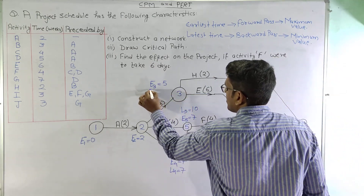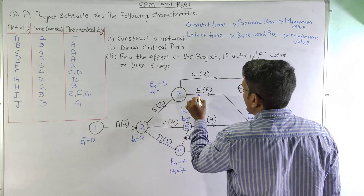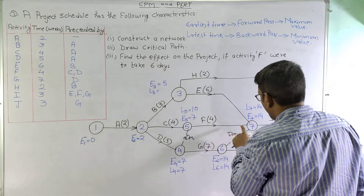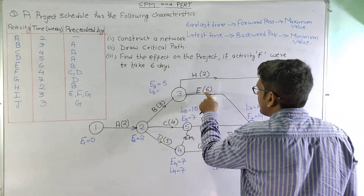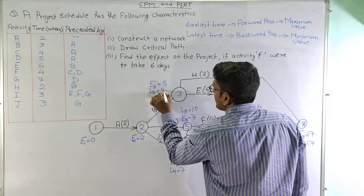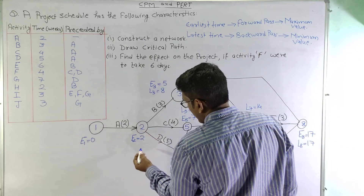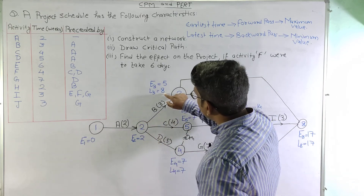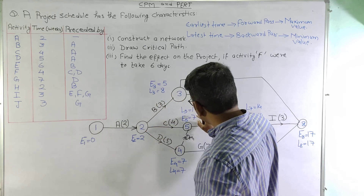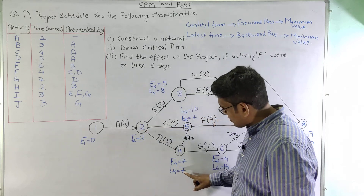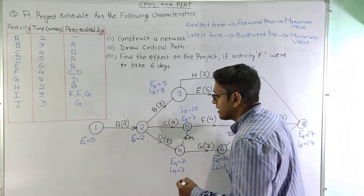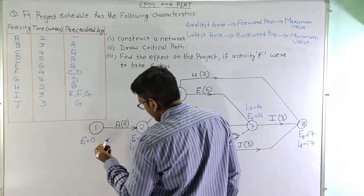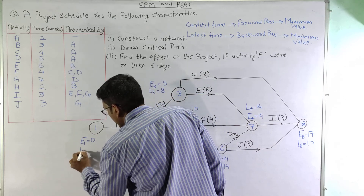At node 3, more than one outgoing arrow: 17 − 2 = 15, and 14 − 6 = 8. We select the minimum, so L3 = 8. At node 2, three outgoing activities: 8 − 3 = 5, 10 − 4 = 6, and 7 − 5 = 2. We select the minimum, so L2 = 2. At the initial node: 2 − 2 = 0, so L1 = 0.